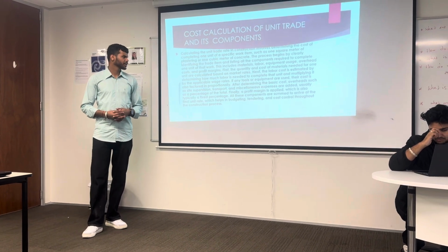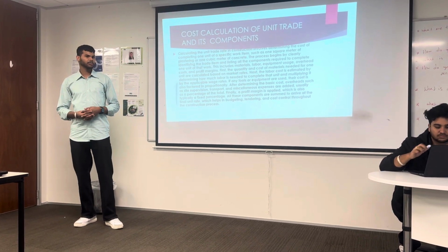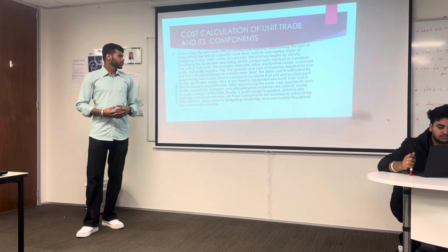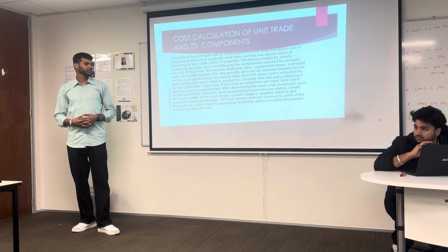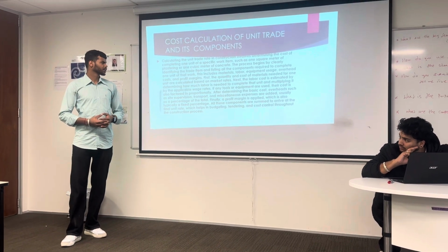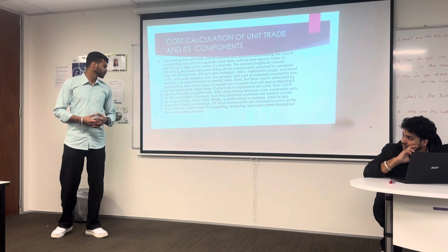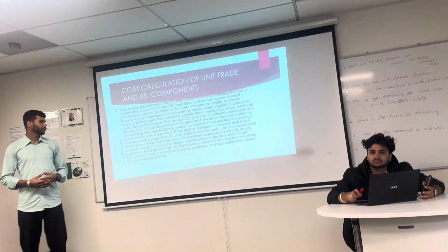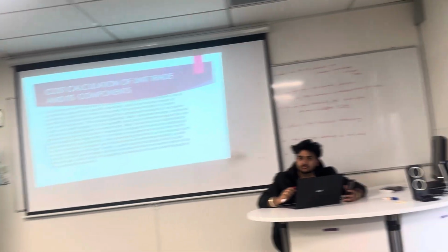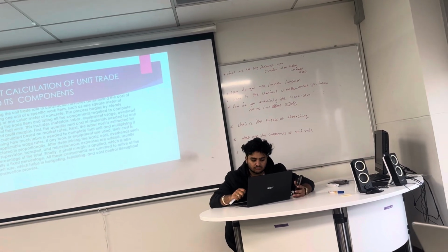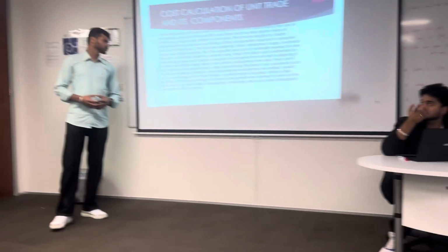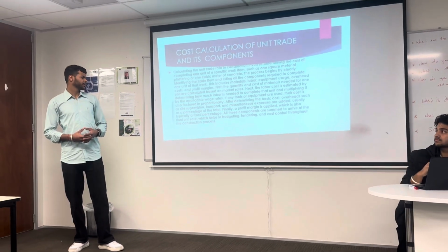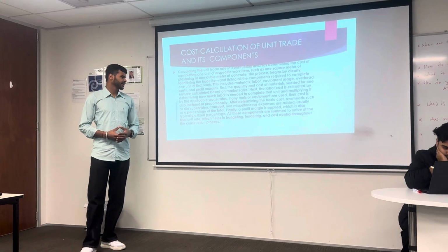First, the quantity and cost of material needed for 1 unit are calculated based on the market rates. Next, the labor cost is estimated by determining how much labor is needed to complete the unit and multiplying it by the applicable wage rates. If any tools or equipment are used, their cost is also factored in proportionally. After determining the basic cost, overheads such as site supervision, transport, and miscellaneous expenses are added, usually a percentage of the total. Finally, a profit margin is applied, which is also typically a fixed percentage.